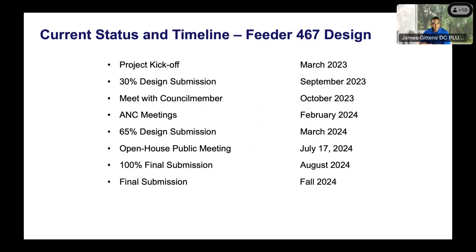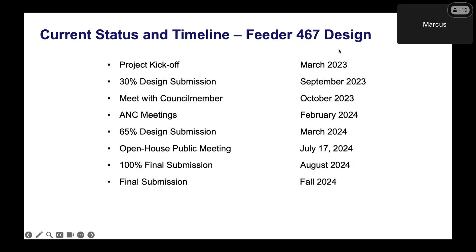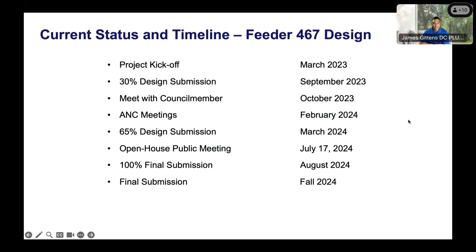Speaking of timeline for Feeder 467, this focuses on the design. Currently we're in July conducting the open house. What we show here is a typical schedule for a DC project: 30% design, 65% design — and at this point we do the open house. In August the designers will submit their 100% final submission, and ultimately this fall we will put the project out for construction bid.